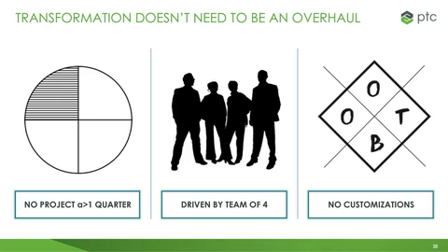First phase, naming standard. We just identified it and worked with our customers. Second phase, we renamed all of our parts in our organization in every single company, every single view. Next step, we created our classification schema. Next step, classified all of our end items. Step after that, we classified all of our hardware, etc. You can make a difference taking smaller bites. And the impact, if you fail, is much smaller.